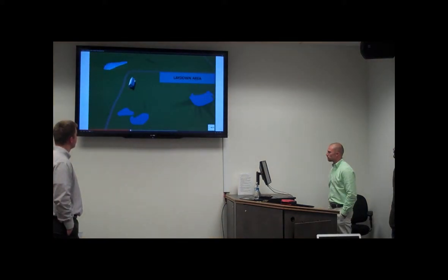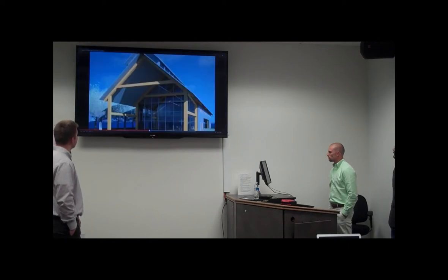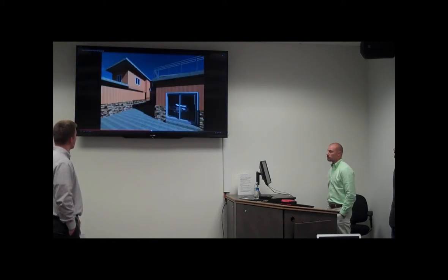The first phase of construction would start with the barn, followed by the dorm, and finally the school. The proximity is away from the material laydown area to ensure safety and security of kids, and the school can be operational. Finally, residences and chapel would be built nearer to the material laydown area. To keep the construction costs low, wood construction would be used over slab on grade foundation for all the buildings.